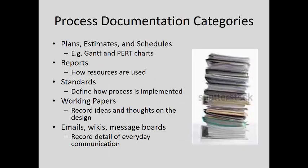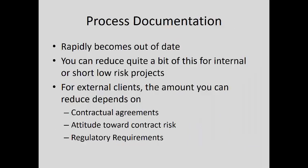Process documentation categories include plans, estimates, and schedules — like Gantt and PERT charts, or Kanban boards and burndown charts for agile development. Also reports on how resources are being used, standards defining how the process is implemented, working papers with ideas or thoughts on designs, and emails, wikis, or message boards recording everyday communication. Sometimes you need the emails to back up why certain decisions were made — even instant messages can serve that purpose. The problem with process documentation is it rapidly becomes out of date. You can reduce it significantly for internal or short low-risk projects, and that's where agile comes in.